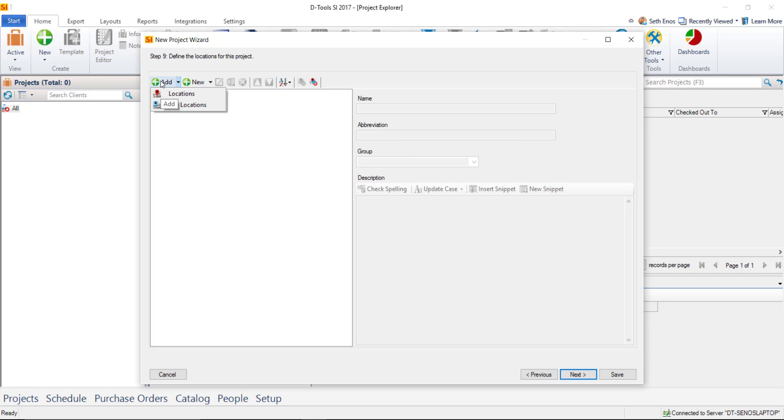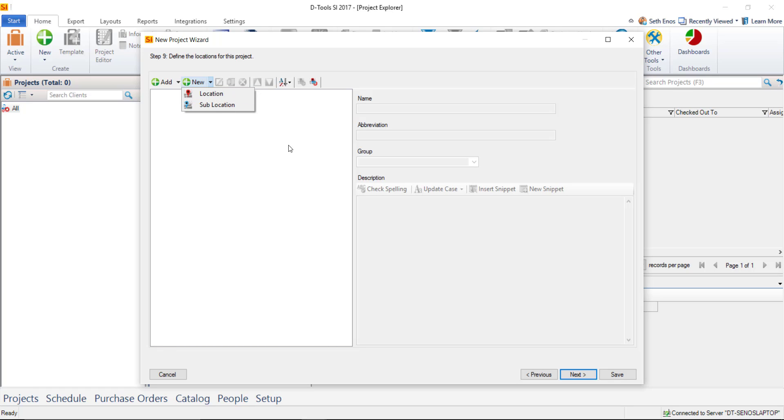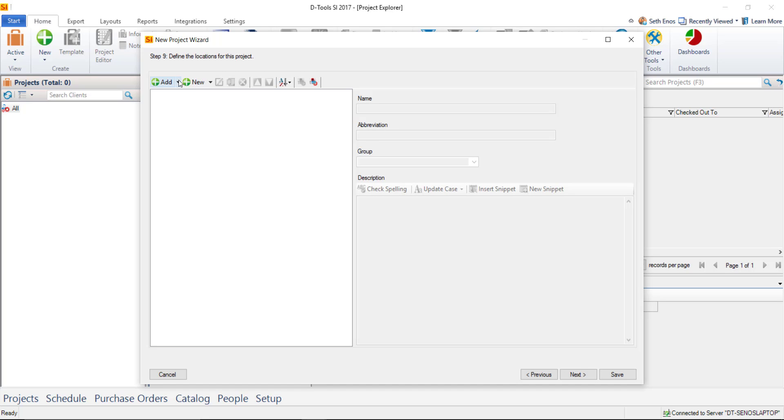Adding is pulling from a preset list and that's another setting under your control panel that you can create. What we'll be looking at is the default list here. Or you can type new ones. Again, choose whether you're doing a location or a sub-location. So now I'm going to describe the locations and sub-locations to you. You can have up to five levels of locations out here, and that would be using the sub-location option. An example for that being first you enter the names of buildings, Main House, Guest House, Pool House. Then beneath that Main House you might add a sub-location for the floors. And then beneath the floors you would add a sub-location for the rooms.